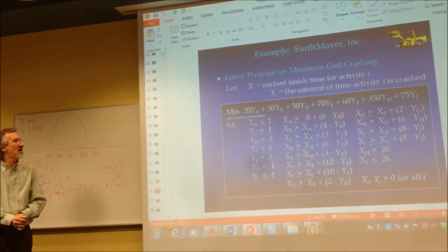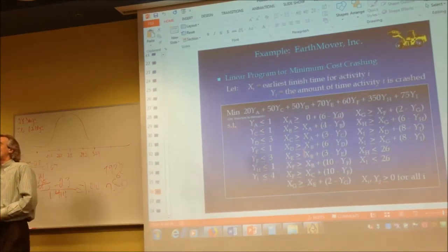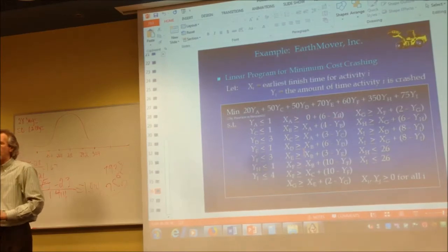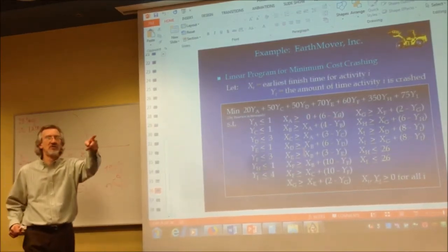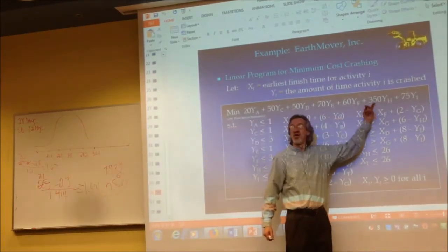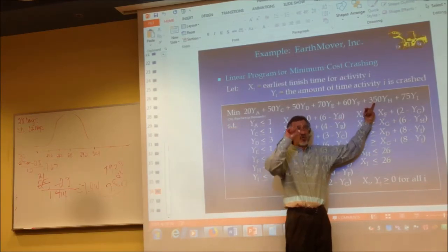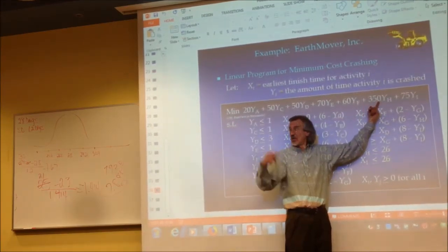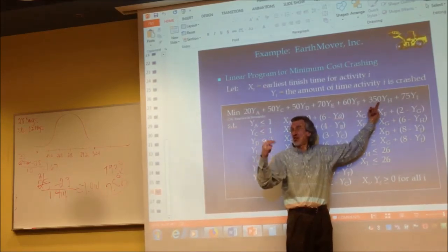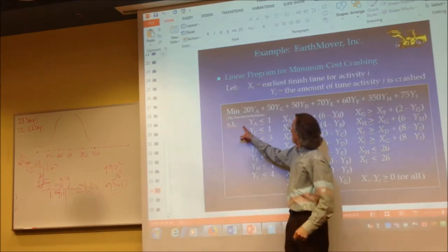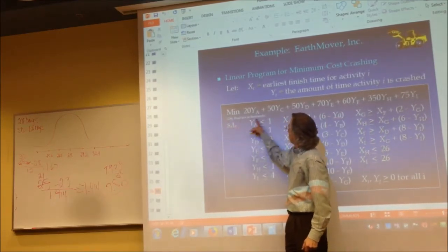So if I said to you, hey, we're thinking about crashing activity H, 2 units of time, what would be the cost? 700. I heard it over here. 700. Because you could just look at this and go, oh, this is the cost for 1 unit of crashing time for activity H. And if I asked what's the cost for crashing 2 if we decide to crash this one? 700. The only catch, so I don't want you to get confused, is that in order to save space, the objective function is in thousands.